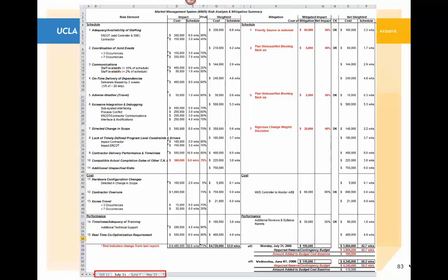My technique is that I keep all the tabs. The one on the right, May 23rd, was the first one that was done, and that tab is here as it originally was, and then June the 7th, the one we just looked at, and then this one is July the 31st. And then we can look back and we have traceability from all the previous, and there's no smoke and mirrors or anything like that. It's very clear and it stands out what the changes are.